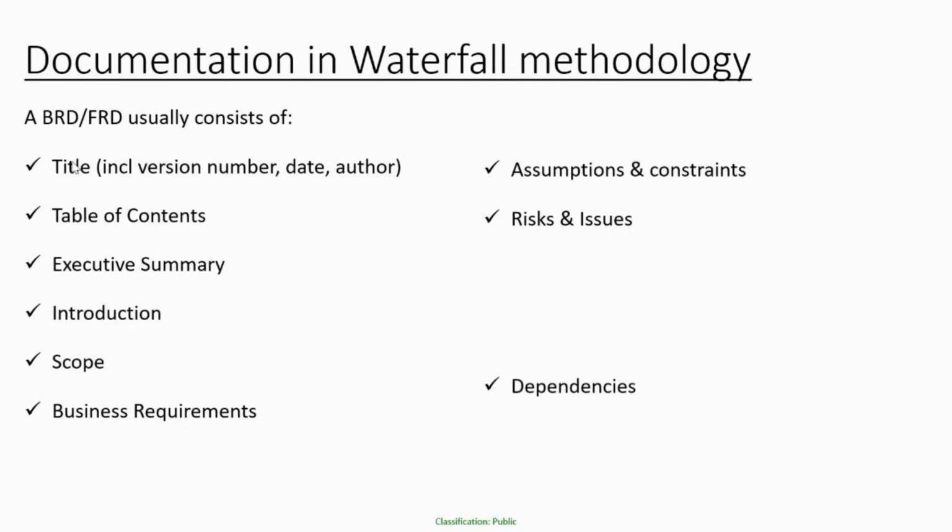Okay. And then there are some dependencies. Dependencies could be on teams, on the existing system, or on the limitation set by an external regulatory body. There could be any such dependencies. For example, your business team is working on something, but there is a dependency on one of their sub teams to get some compliance approvals within their team. If there's any dependency, you try to call it out here.